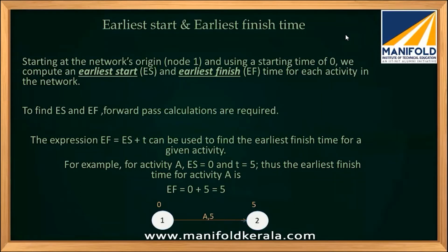One thing to be noted is that we are going forward. Earliest start times are calculated based on the forward pass. When we do the examples, I will explain what a forward pass and backward pass are. Just to give you a glimpse, we are moving forward, so the earliest start time will depend on the previous activity. If it's a middle activity, how early the other activity ends will give you the earliest start time for the current activity.